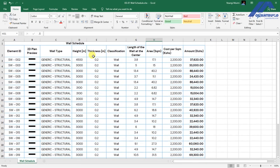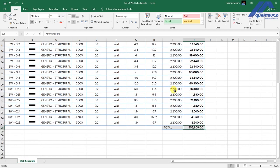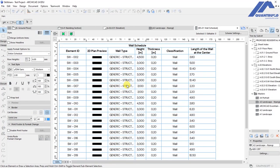Looking at our schedule, we have only the height, thickness, and length at the center of the wall, which gives us the area. This means we have not deducted the area of the openings, so this cost also includes the walling that was supposed to be part of those openings — doors and windows. To get a net area, meaning we have deducted the area of the openings, let's get back to ArchiCAD and I will show you how to extract that area. Instead of applying the center line length multiplied by height, we want the net area extracted directly from ArchiCAD, where it calculates wall area and then deducts the area covered by openings.